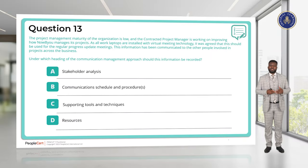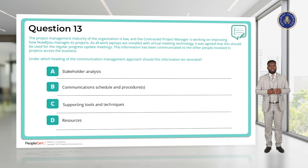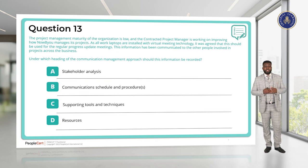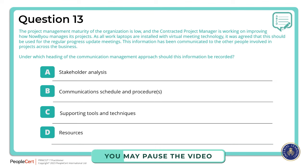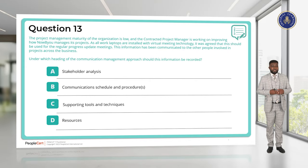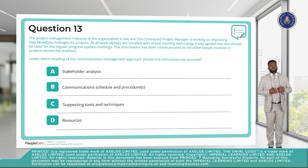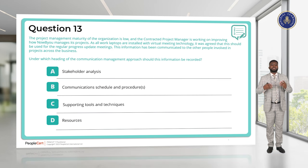Question 13. The project management maturity of the organisation is low. As all work laptops are installed with virtual meeting technology, it was agreed this should be used for regular progress update meetings. This information has been communicated to people involved in the project across the business. Under which heading of the communication management approach should this information be recorded? It's not stakeholder analysis, not resources, not the communication schedule — it is one of our supporting tools and techniques. We've decided to use virtual meeting technology as a tool to facilitate communication. The answer is C.